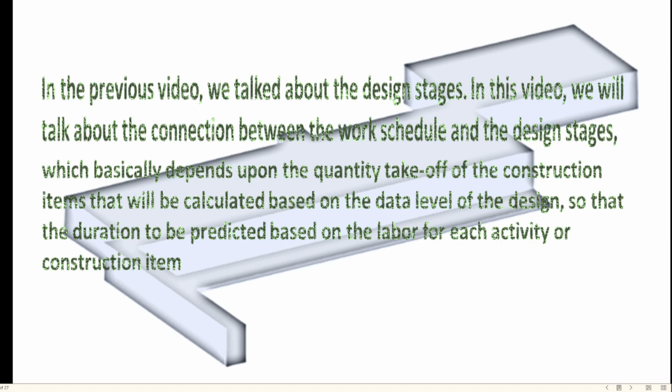In the previous video, we talked about the design stage. In this video, we will talk about the connection between the work schedule and the design stage, which basically depends upon the quantity take-off of the construction items that will be calculated based on the data level of the design, so that the duration can be predicted based on the labor for each activity or construction item.